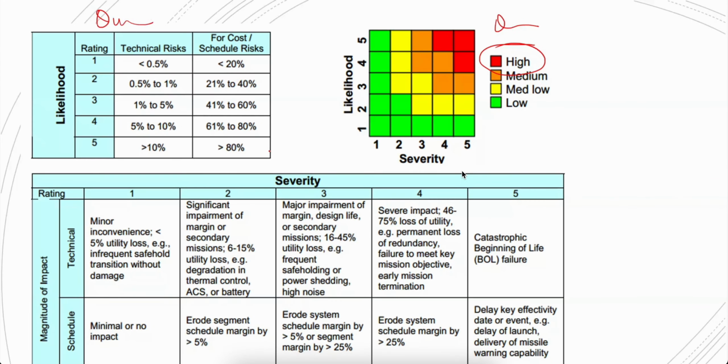And then once you have those two, then you can say, okay, let's try to put together some cost. If something does happen, how much is it going to impact me? The impacts. Remember, we said impact analysis, impact time response. We said score is equal to impact times probability, right?